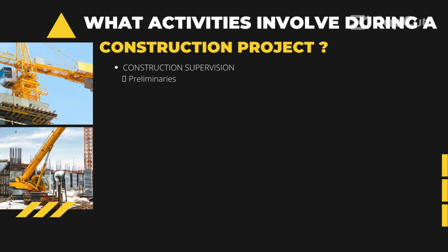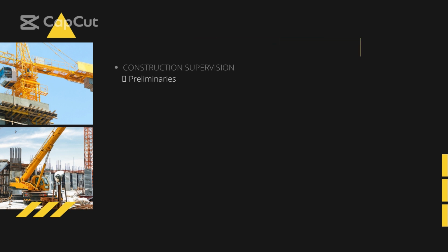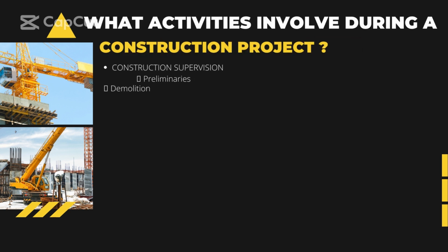The construction supervisor has to monitor and supervise activities such as preliminaries. The preliminaries bill of quantities of a construction project provides general information, mandatory instructions, and set up running costs for a construction contract period.